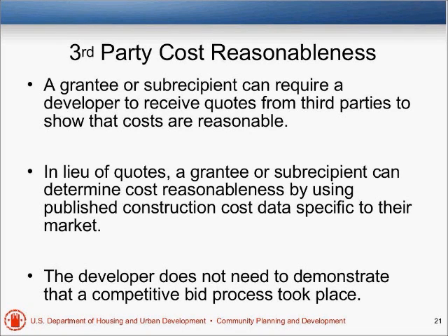Yes. Okay. So one issue that I've seen with that, especially with nonprofits, is that they often don't have the cash to be able to do that, and so they either have to borrow money, which increases their cost by having a line of credit, or sometimes they do things they shouldn't and say things were paid when they weren't.